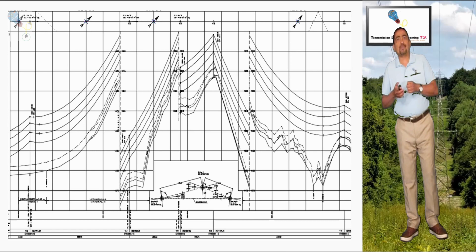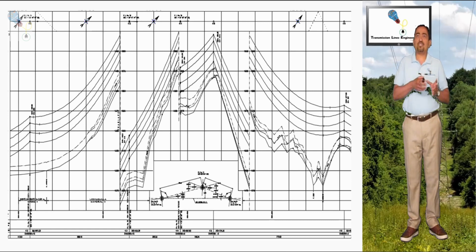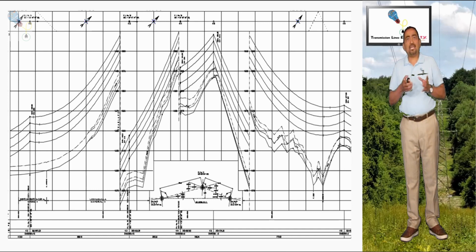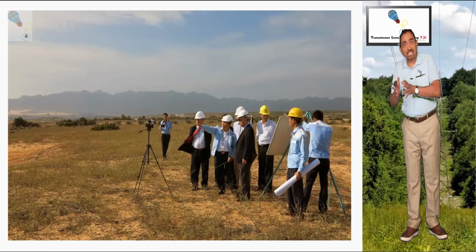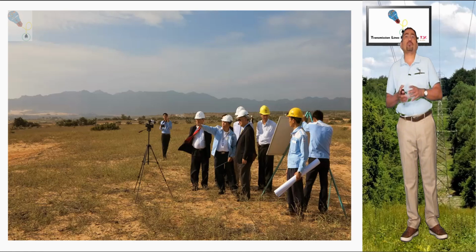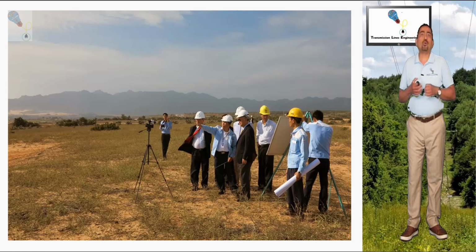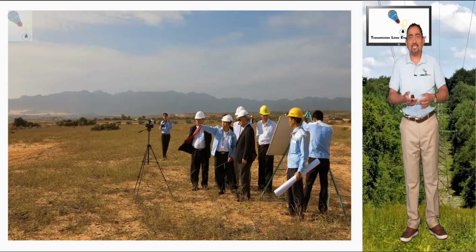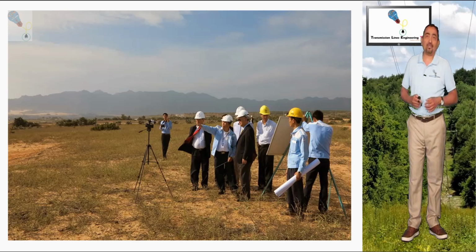On the other hand, and regarding the structural locations, it is at this stage when preparations are made for the engineering team, supported by the construction area, to have a site visit to physically inspect each structural location to determine possible final movements. Those final movements will be made in the next package to be sent to the client. On many occasions, this visit is carried out jointly with the line owner.